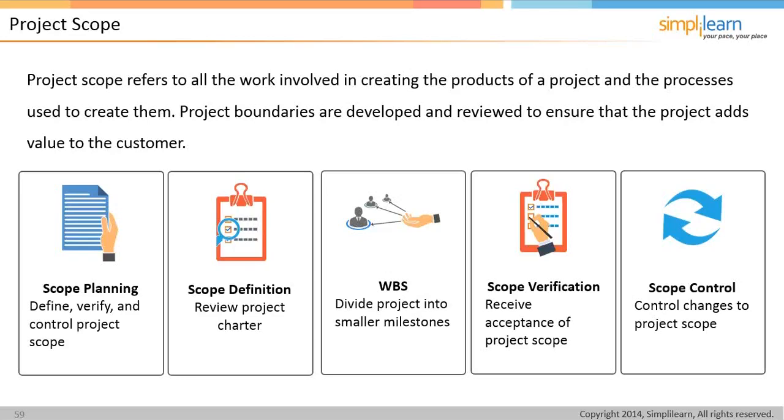So you define your boundaries, and what you do, practically speaking, is this. You uncover an opportunity to improve the business, but it's outside of the scope of your project. You don't forget about it. You identify it as a potential future project, or maybe even as a just do it. You recognize because it's outside of the scope, you're not going to include it at this point in time, but it's documented, it's reported to the appropriate person. There's probably some conversation that takes place, and maybe during one of your milestone updates, you bring up the issue and make people aware of it, but you don't include it in the project scope.